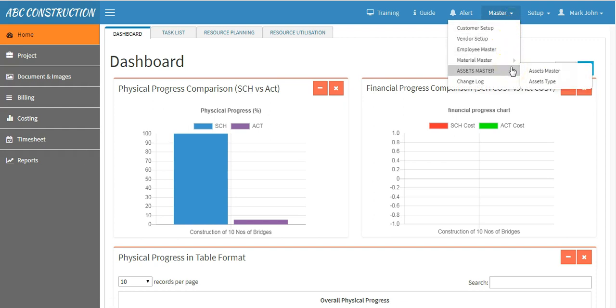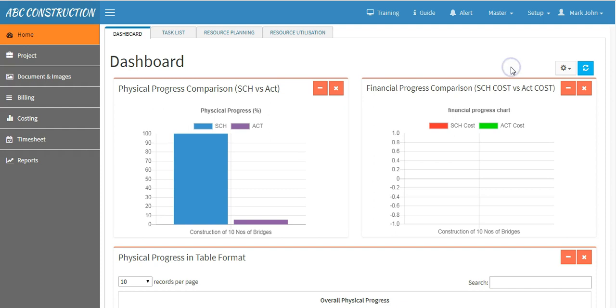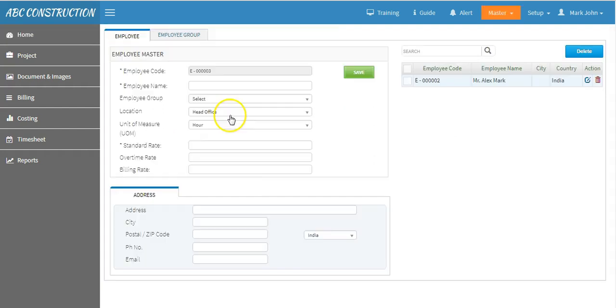In every master, there is a field called standard rate which represents the cost per hour or unit of that master. Make sure these masters are created with the standard rate which will be needed for our cost estimates.